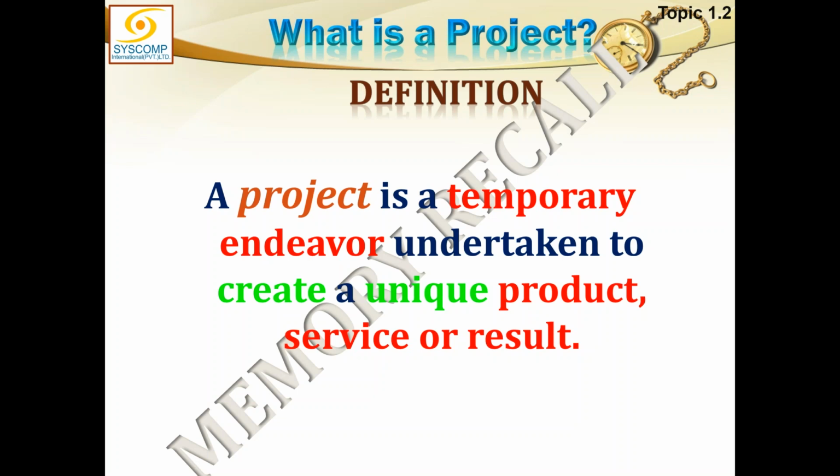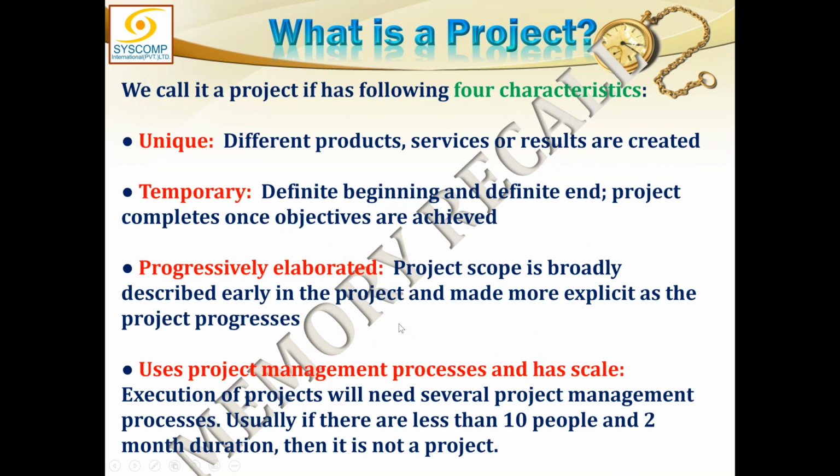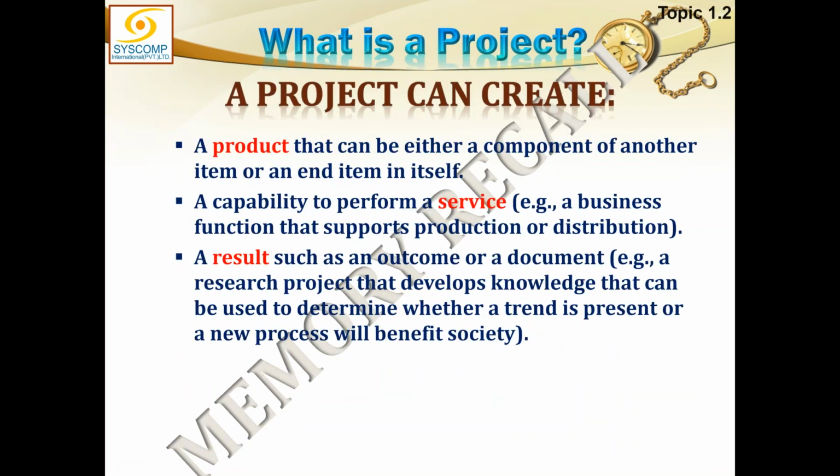So in designing the project, we may consider the benefit realization, but it is not the responsibility of the project manager to realize all the benefit. It is possible that while the project is going on, some benefits start yielding. Until the project is going on, those benefit realizations happening within the project are within the responsibility of the project manager. But as soon as the project finishes and the product is handed over, after that it is someone else's responsibility. But someone will take care of those benefits.